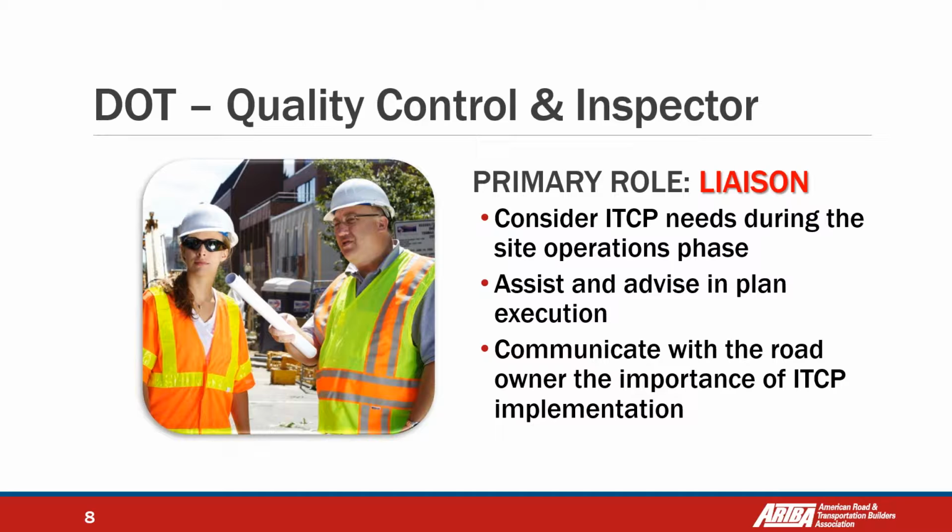that is going to help us to prevent accidents. I was providing training last year at the end of the year in Florida, and they have some projects on the I-95. The I-95 joins all the East Coast, and they told me, hey, just because we had this accident, we stopped 4 days. OSHA asked us to stop while they were doing all the investigation of the incident. And they calculated that the cost of just stopping work was $4 million.